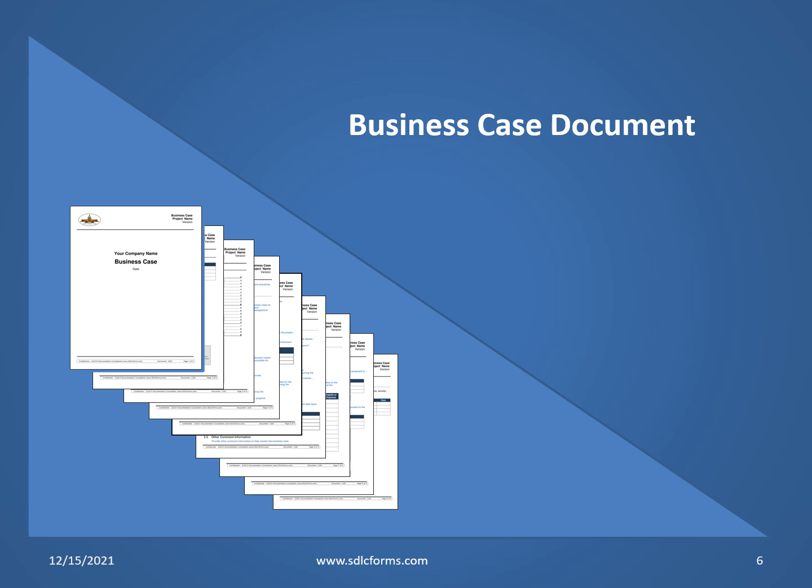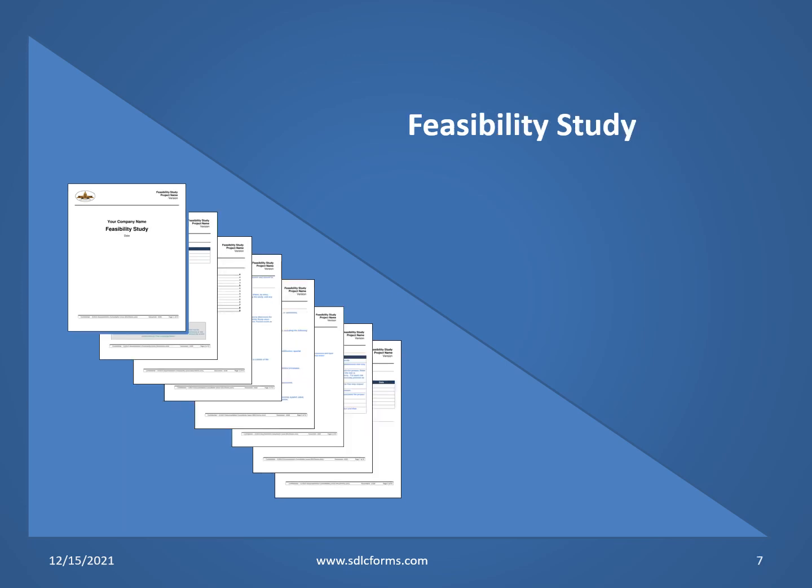or initiative before the organization commits time, resources, and expenditure. A feasibility study uses business and technical information and cost data to determine the economic potential and practicality, i.e., feasibility, of a project.